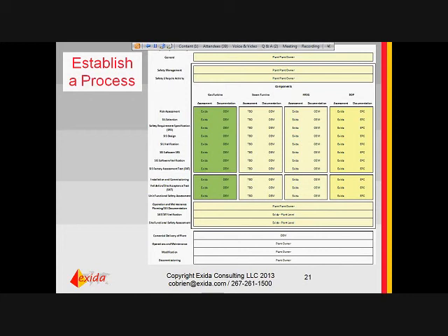So often you might have individual groups or organizations handling key pieces of equipment, and clearly delineating the handoff and responsibility and procedures to be used across these, we can call them islands, is important, so that at the end of the day, when everything's integrated, the proper things have been considered and addressed in the right way. So establishing that process up front is very important. And it really saves a lot of rework. And sometimes if it's not done properly, it's really not practical to have a compliant project or plan at the end of the day.